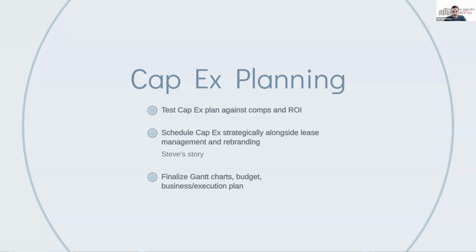So the lesson learned there is when you start strategically planning how you're going to execute the CapEx, do it alongside the asset management and the lease management plans. And that's what we do now. So those go hand in hand now. We close a property, we start doing lease management first, identifying at-risk residents, at-risk tenant base, people that we're going to have to evict. And we start doing all those first, and then slowly bring on the CapEx.